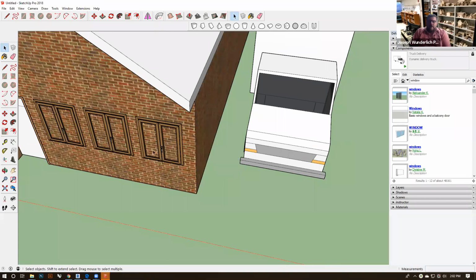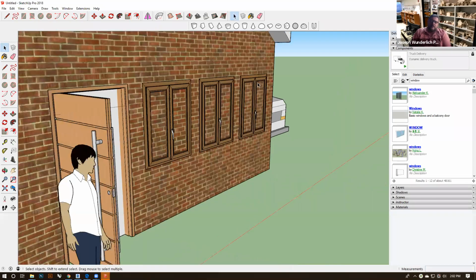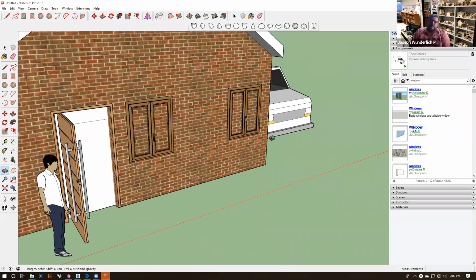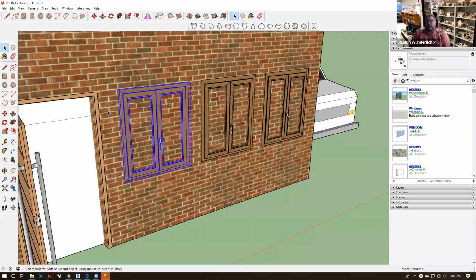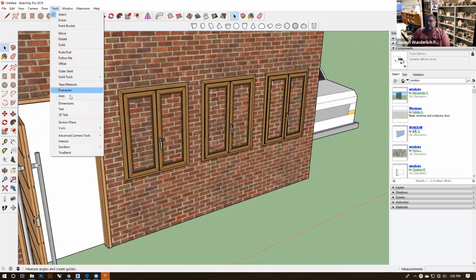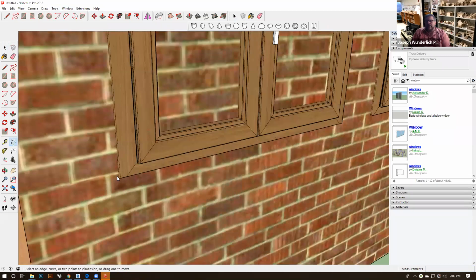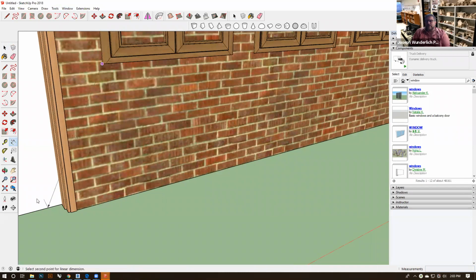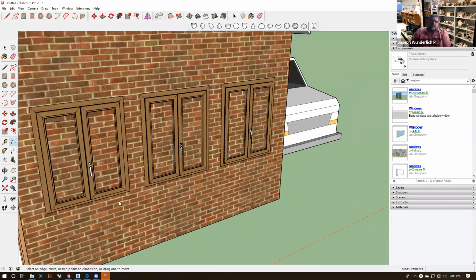And that'll vary. I've gone through building inspection in different states, and Pennsylvania's somewhere in the middle. California is extremely strict, where there are nailing schedules. You have to actually show door schedules, window schedules, really serious details for plumbing and gas lines, earthquake and structural things. And Texas was the opposite, especially outside the cities, where there was basically no code enforcement at all 35 years ago when I was there.